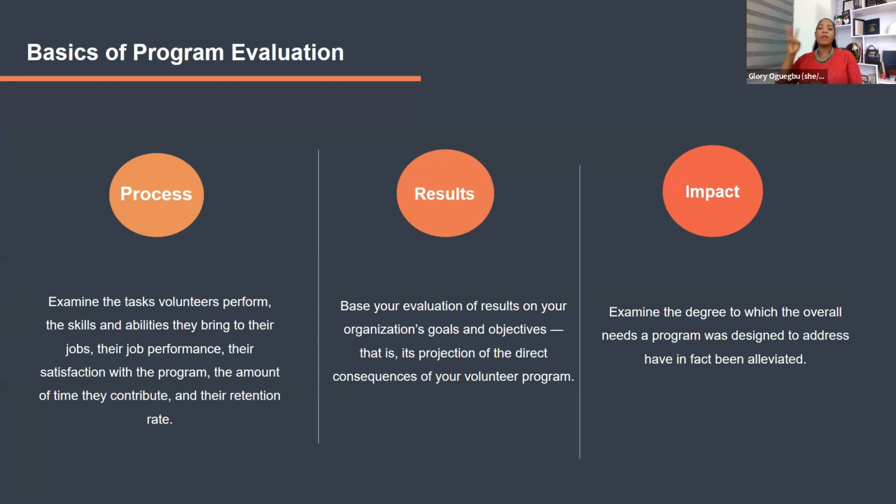That's impact number two. Number one is I've reduced unemployment by 42%. Then I have reduced the number of out-of-school children by 25%. From 100% to 75%, 2,000 kids to 1,500 kids. I've sent 500 to school, and I didn't even do it directly. The interesting thing is that I did a project for their parents. Their parents are able to give back a little bit of half payments for their fees, so that the school is able to accept them back. That's an example of the impact.